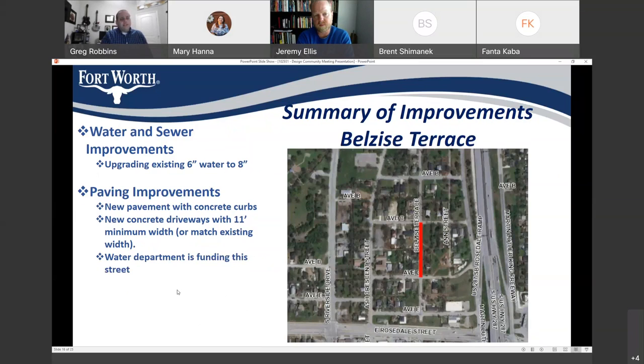Bellezee's Terrace will see the existing 6-inch water upgraded to 8-inch, new pavement, new concrete curbs, and existing driveways replaced with concrete. As mentioned, the water department is funding this street.